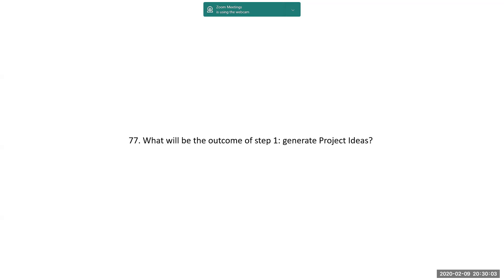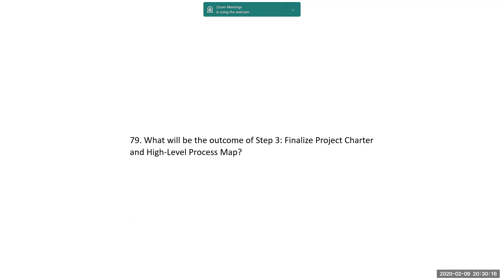What will be the outcome of Step 1? Generate project ideas — different projects. What will be the outcome of Step 2? Select projects — compare projects and select the best one. What will be the outcome of Step 3? Finalized project charter and high-level process map — a clear-cut definition of what the project is, the scope, the problem statement, and the ultimate objective.